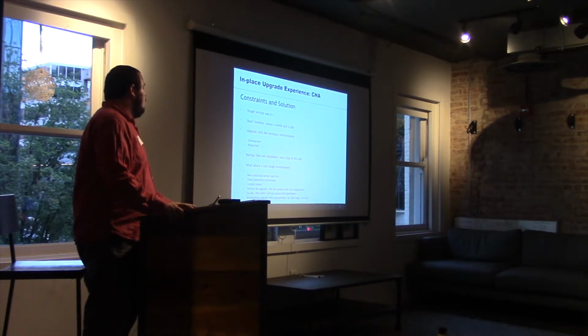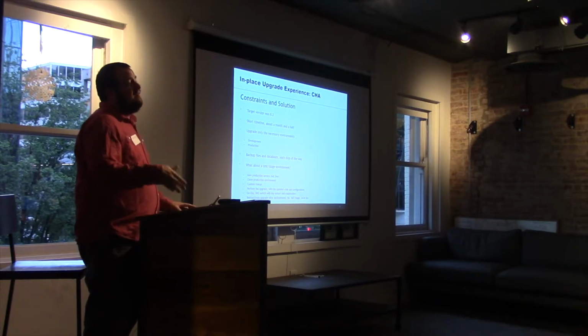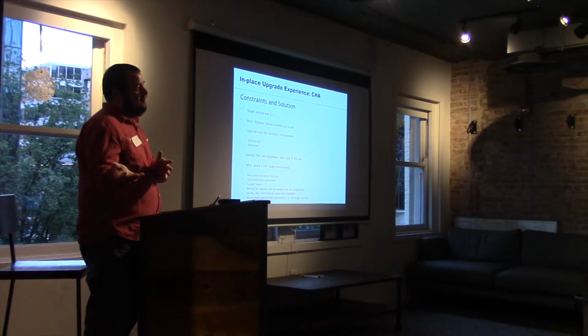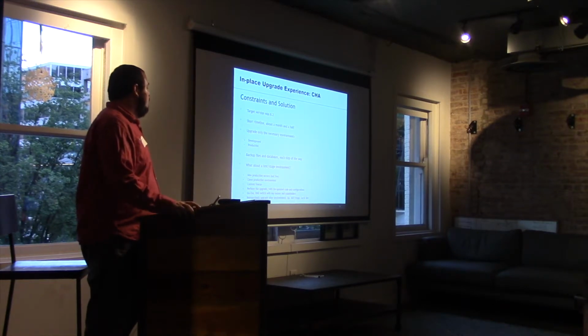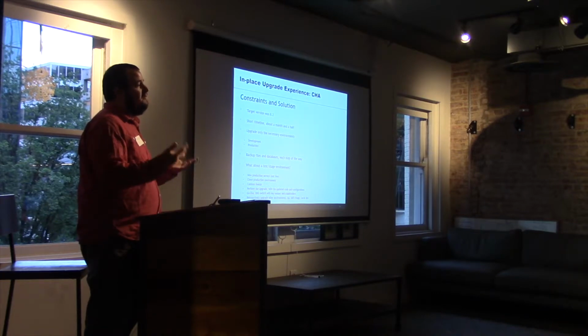For content freeze, as I mentioned, we had about a week or two that got extended. We performed the upgrade with the updated code and configurations. And then for go live, we did the DNS switch to the completely new production environment, with key testers and stakeholders involved during the go live, so they could test and ensure the flow was good.